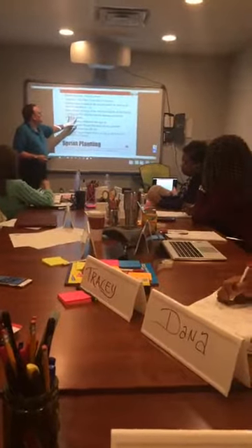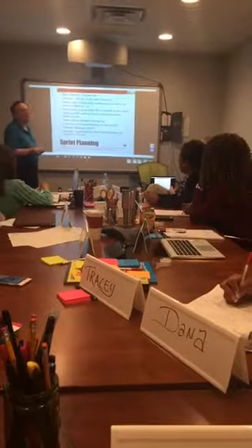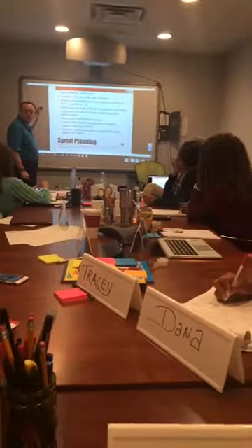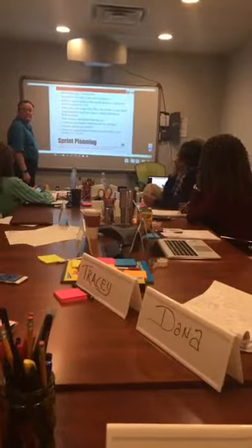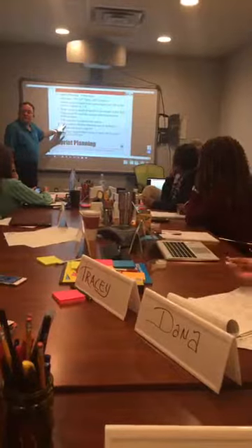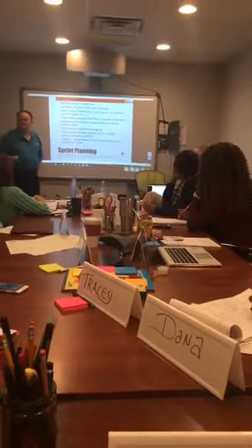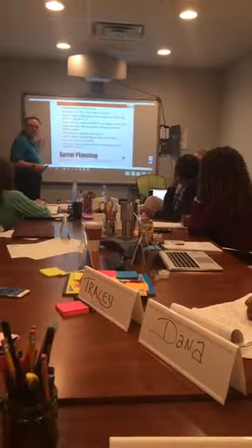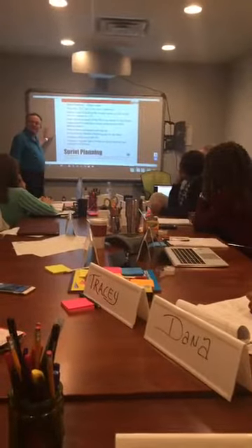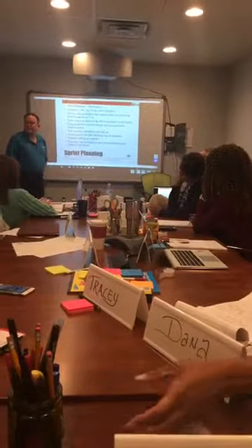Understanding the product owner's wish list. This is clearly defined, prioritized backlog items. Not just the user stories, but the priority. How important they are. At this point, you're going to have the client there, you're going to have the product owner there, and you're going to have all of your development team members. They're going to take each user story that you're planning to implement in that sprint, and the development team is going to break that down into tasks.